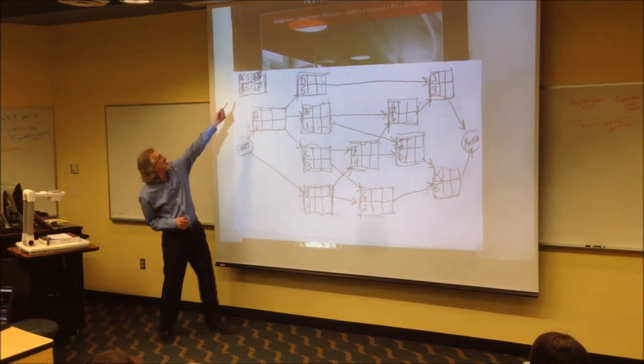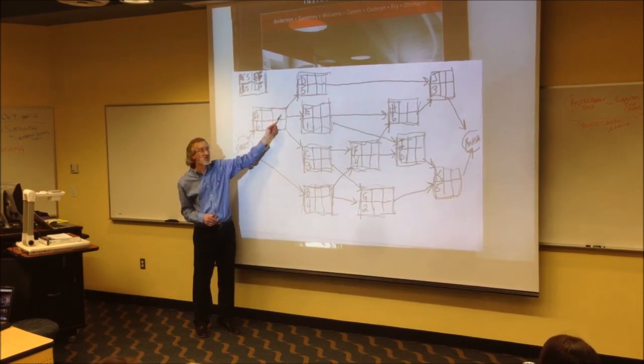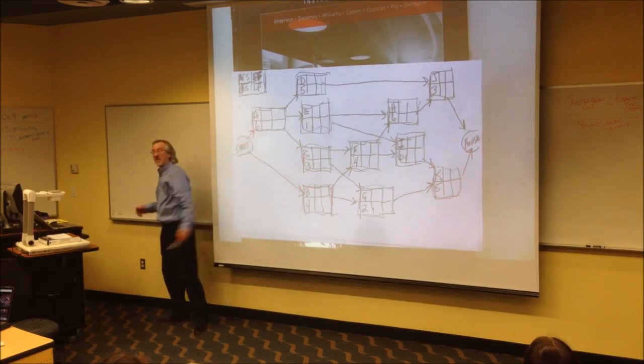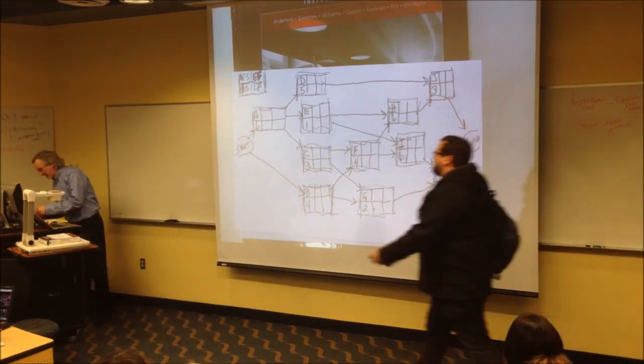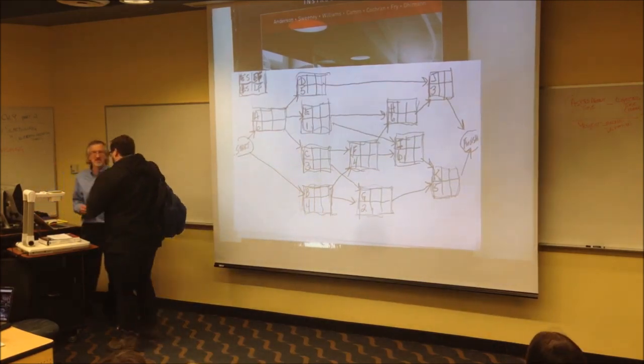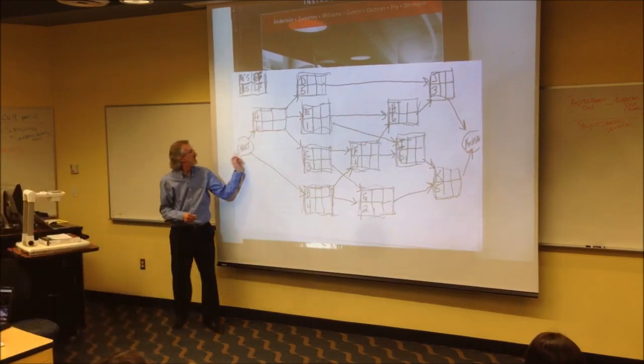Here's the key. Top left-hand corner would be earliest start. Top right-hand corner is earliest finish. Bottom left then is latest start. Bottom right is latest finish. Okay, there's our key. Here's the start.